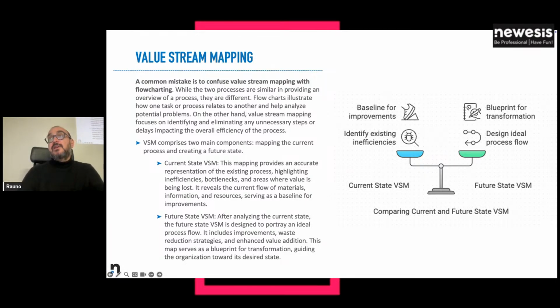And with these measurements, you define a flow that is not just the dependency between the different stages, but is the actual timeline of the different stages, with also information about the error rate: how often these passages between stages are interrupted or blocked, or how often it circles back because, for example, I release a software, but then there's a bug, and so it comes back to development. It does not go to the release state.